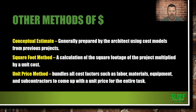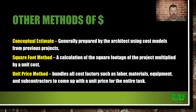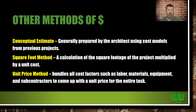It's easy to price a house over and over — lumber is the price of lumber and GCs come up with a general square foot price. We could possibly use a square foot method for retaining walls, sod, mulch, and similar items. Unit price estimating bundles all cost factors — labor, materials, equipment, and subcontractors — into a single unit price for an entire task. But I don't think we'd typically give a conceptual estimate for landscape work; there are too many variables we face.